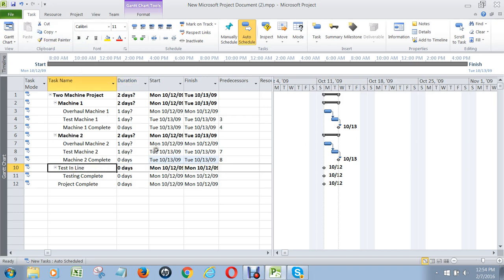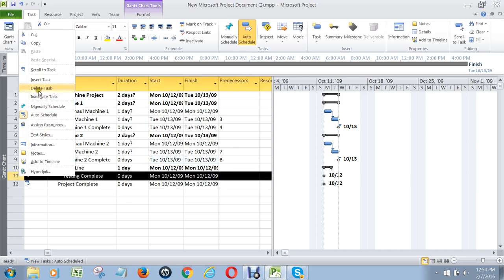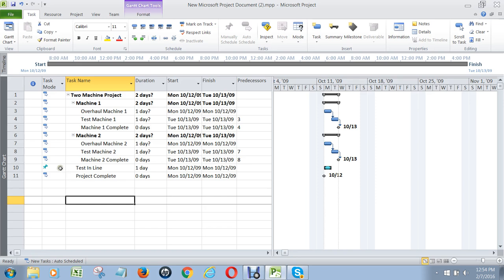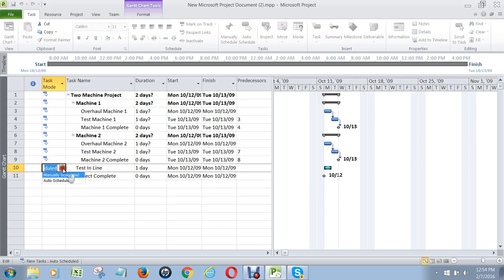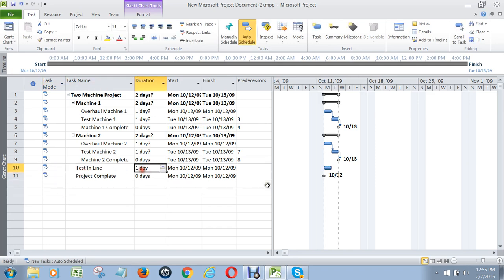I'm going to take that off and put it back to its default of one day. I'm not going to put that milestone in there — it's confusing the whole issue. And notice when I made that change, this became manually scheduled. Make sure it goes back to auto-scheduled. Testing in line is there and then project complete is there as well.